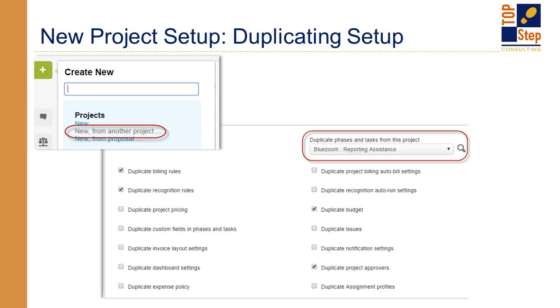Again, keeping those phases and tasks consistent allows you to do things like time studies, allows just that consistency amongst projects too, so that when staff are entering time, the time logged to project A compared to time logged on project B, they're seeing the exact same tasks and or phases, potentially with minor tweaks, but they are seeing those same ones, and allows for more consistent and reliable data reporting there.